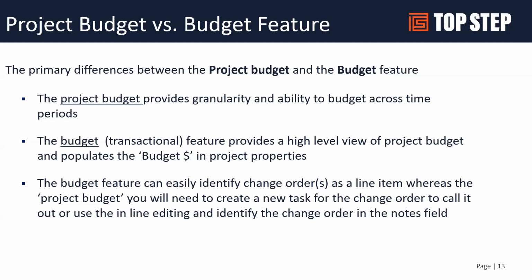We've seen it where customers wanted to copy bookings from a period and store them as a baseline, so they could compare the bookings from the past to what the bookings are currently to see how they've changed. We've written some scripts here at TopStep for customers to be able to do that sort of storage of the bookings by period data into the budget table, to then report against and see some of those nuances. So that could be a very powerful tool.